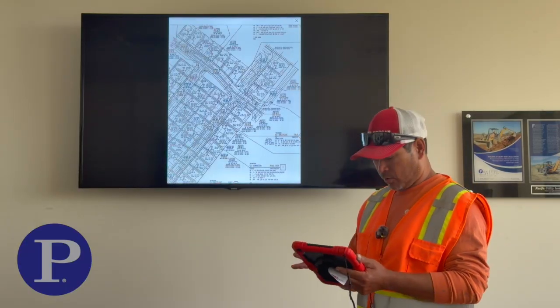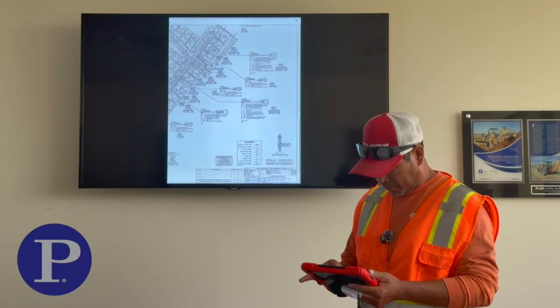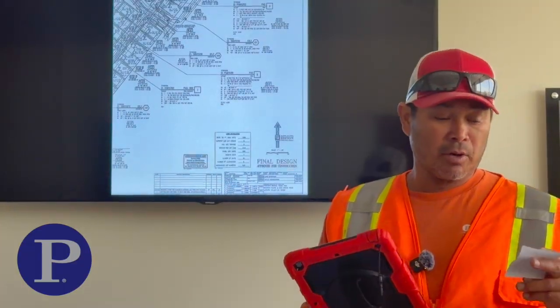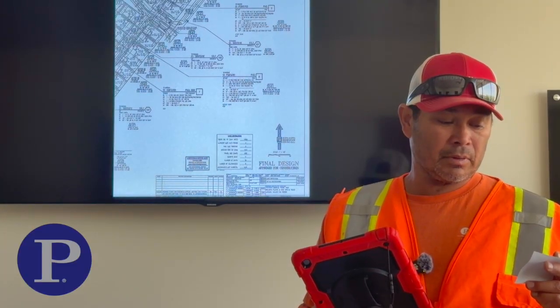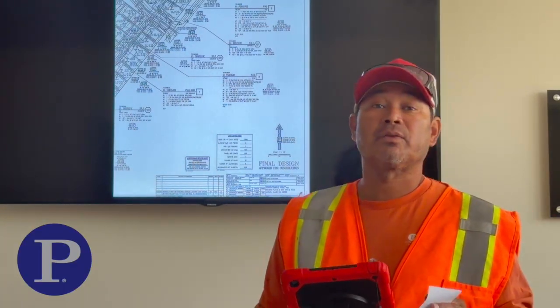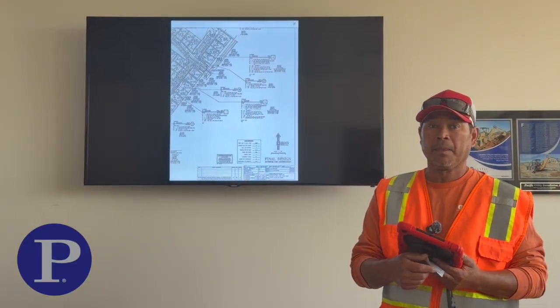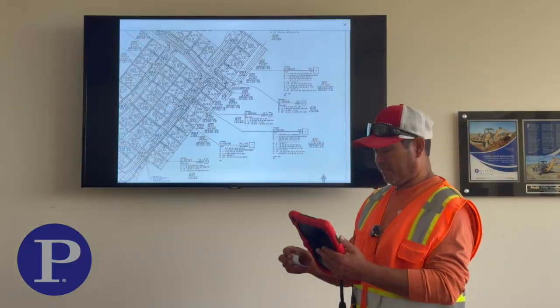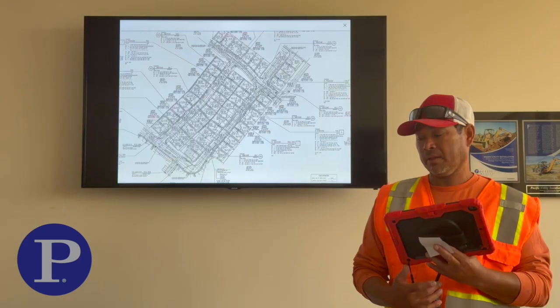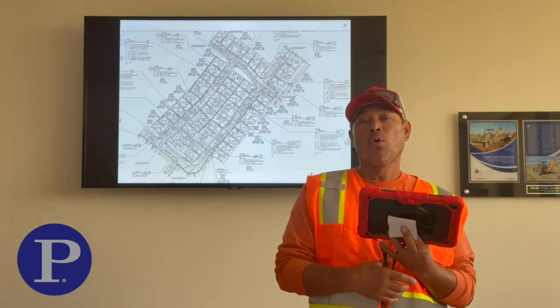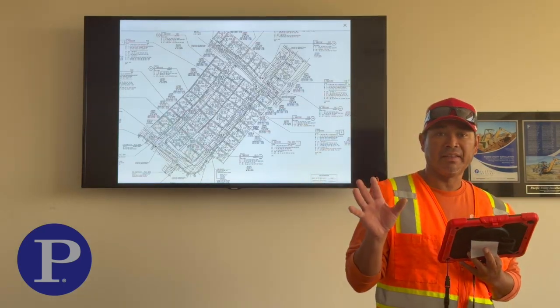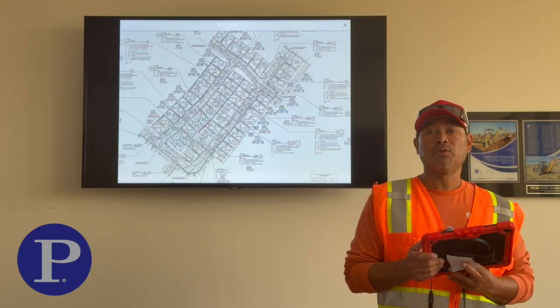This specific work order is work order 2. In the scope of work, we have 2,500 linear feet of pipe. But for this specific job, doing my calculation, we have about 75 90s that we need to place.